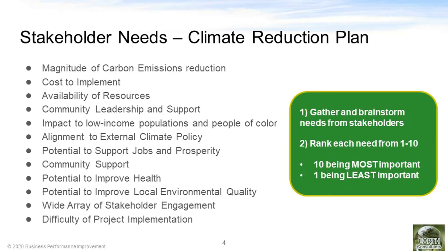Let's take an example of a climate reduction plan. Here are the different stakeholder needs that were identified in the community: the magnitude of carbon emissions reduction, the cost to implement, the availability of resources, community leadership and support, the impact to low-income populations and people of color, alignment to external climate policy, the potential to support jobs and prosperity, community support, the potential to improve health, the potential to improve local environmental quality, the wide array of stakeholder engagement, and the difficulty of project implementation.